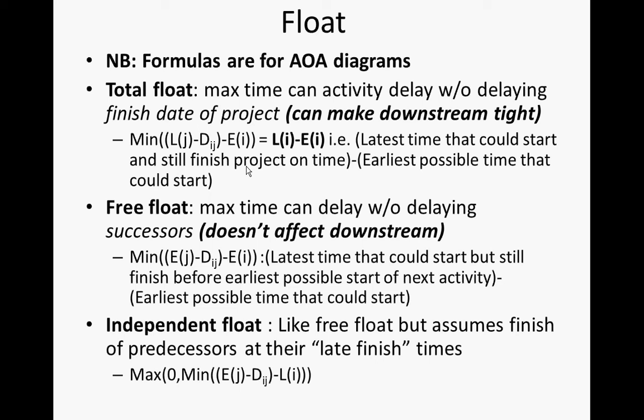That may suddenly mean that someone downstream is now on the critical path who wouldn't have been. And that can impose risks on them, risks of lawsuits if they slip up. They would have had latitude, they would have had slack, they would have had a degree of freedom or wiggle room as to when they can do the project, but now they don't because of my actions.